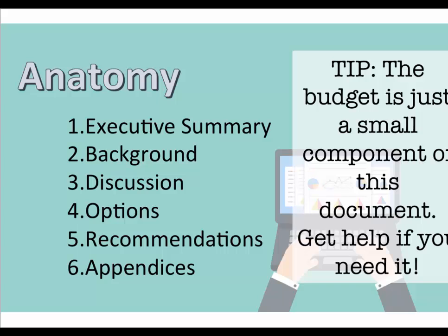So when you think about what you're going to do with the budgets, whatever best practice project you're doing, you're going to need people and you're going to need things. And so you just have to list them. What people do you need to deliver this? Probably midwives. How many? For how long? At how much? It's a pretty simple formula. One midwife delivers 2 hours of education, for example, with 1 hour of preparation at $50 an hour. So each session is probably going to cost you $150 in human resources.